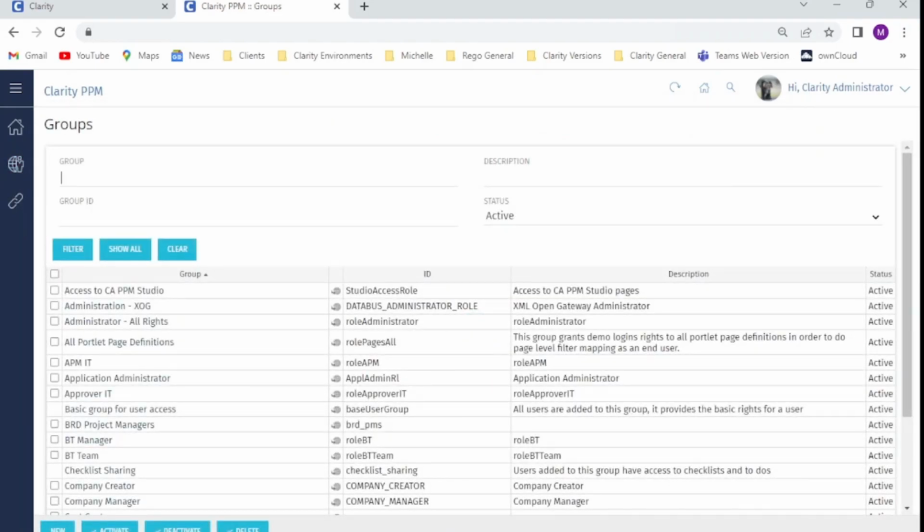Now, each of my test users have been set up with a view as to how the project stage field should be managed. Many organisations have project governance teams who are responsible for stage gate reviews, and the stage field is not able to be updated unless a full review has been completed by the governance team and all the required project deliverables for the current stage have been completed.